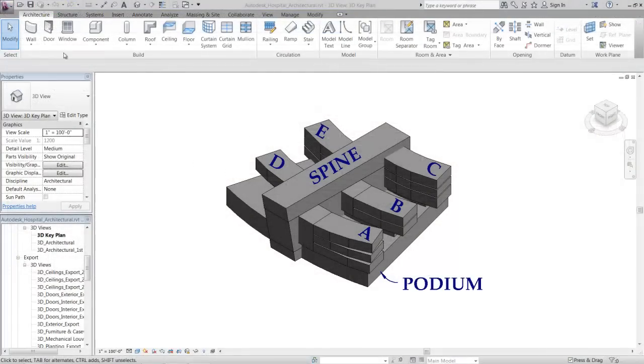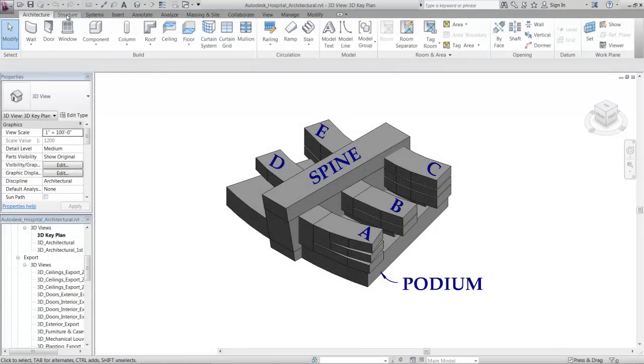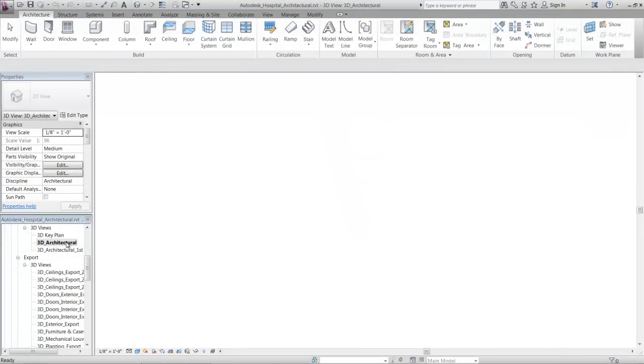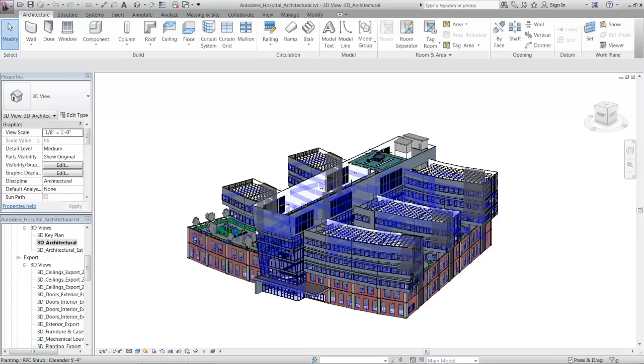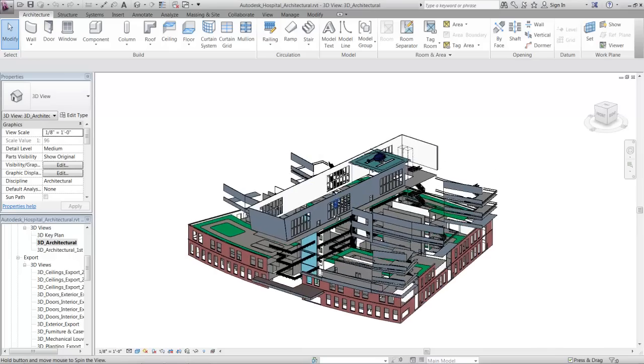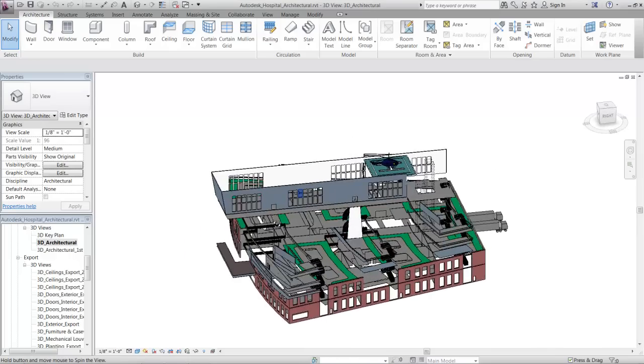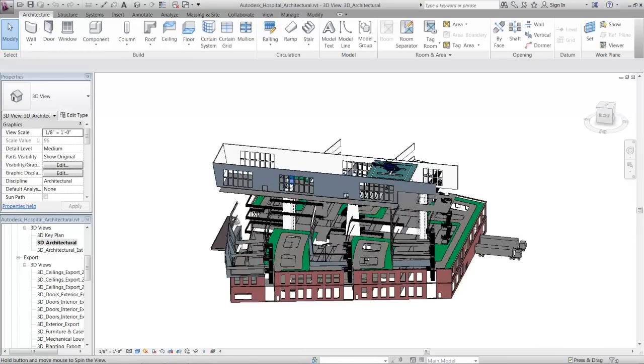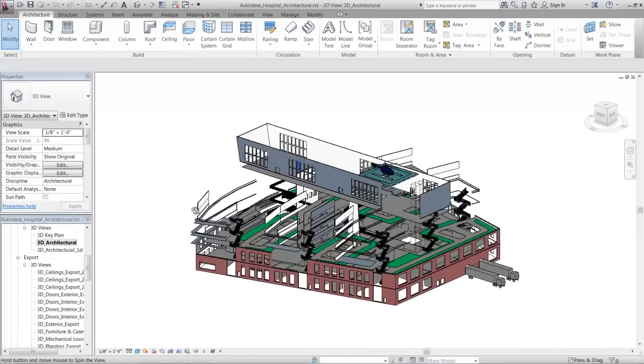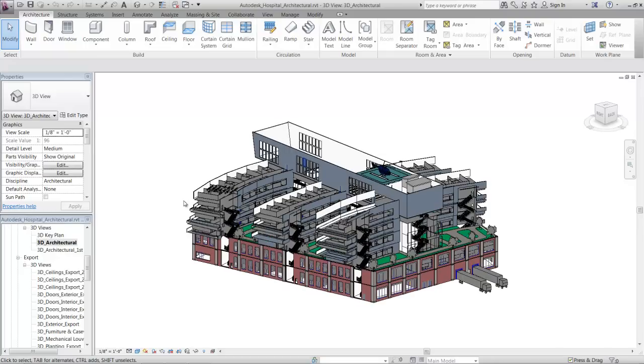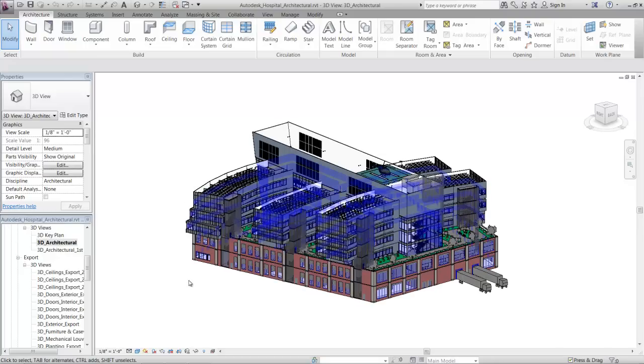Once we have the models we need, we can see that the architectural model has been organized in a way that lends itself to some natural work breakdowns. We can leverage the spatial organization of the design model to help inform how to break apart and organize our constructability model moving ahead.